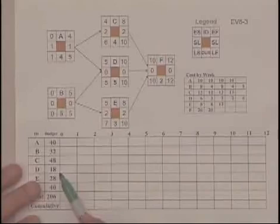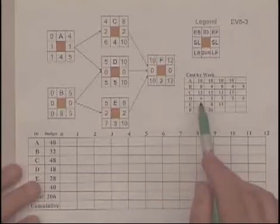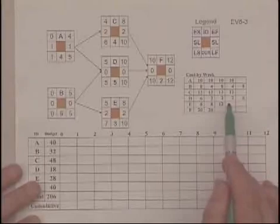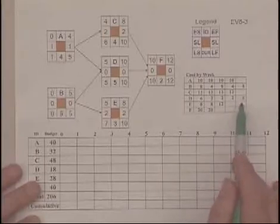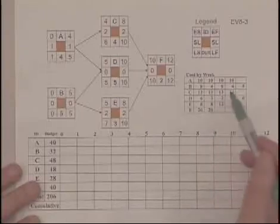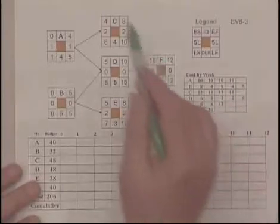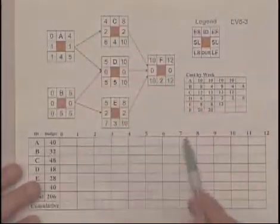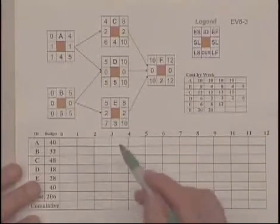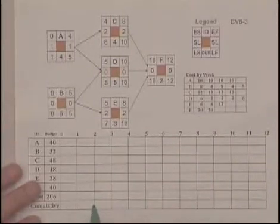Activity D is $18,000 initially: $6,000 the first month, $2,000 for the next three months, and then $6,000 at the end. You can make sense of the remaining figures there. So we want to take this information, utilize the schedule here, and create a time-phased budget for this schedule so we know how much is going to be spent for each of the time periods during the duration of this project.